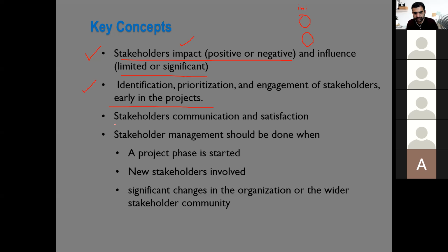So that's why we put stakeholder identification in the initiation phase. Next. Stakeholders, communication, and satisfaction. Yeah, so we should fulfill their communication needs. We should fulfill their requirements and their expectations as per our plan. Stakeholder management should be done when a project phase is started, new stakeholders are involved, or there are significant changes in the organisation or the wider stakeholder community.